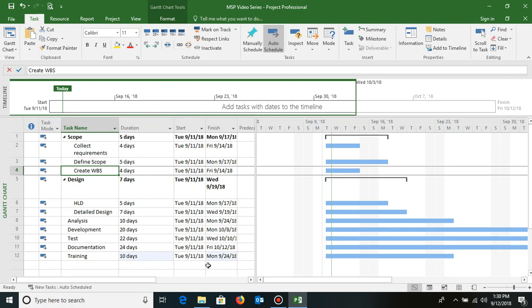But if I want to optimize time and make better utilization of time, I can run these activities parallelly. I start digging the road, and after a certain percentage, like 20 or 30%, of digging that stretch is complete, I can start laying the foundations or the stones. This way I can have activities running parallelly, having a start to start relationship. I can save time, ensure that multiple activities are running parallelly, and finish the project much quicker rather than doing it in a finish to start mode.